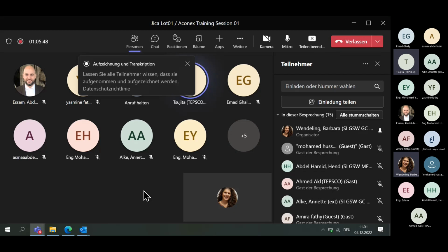Now we have a problem, because if you search in the document register for your documents and open these Excel sheets from the document register, you have only the chapters from our side, because you can only see the Excel sheet which we transmitted to you. And the Excel sheet which you transmitted back to us with the review outcome is only under supplementary file, because this is the only possibility to add new documents to a workflow, to make clear that these are updated or new documents. And therefore, unfortunately, it's not possible to do it in an easier way.